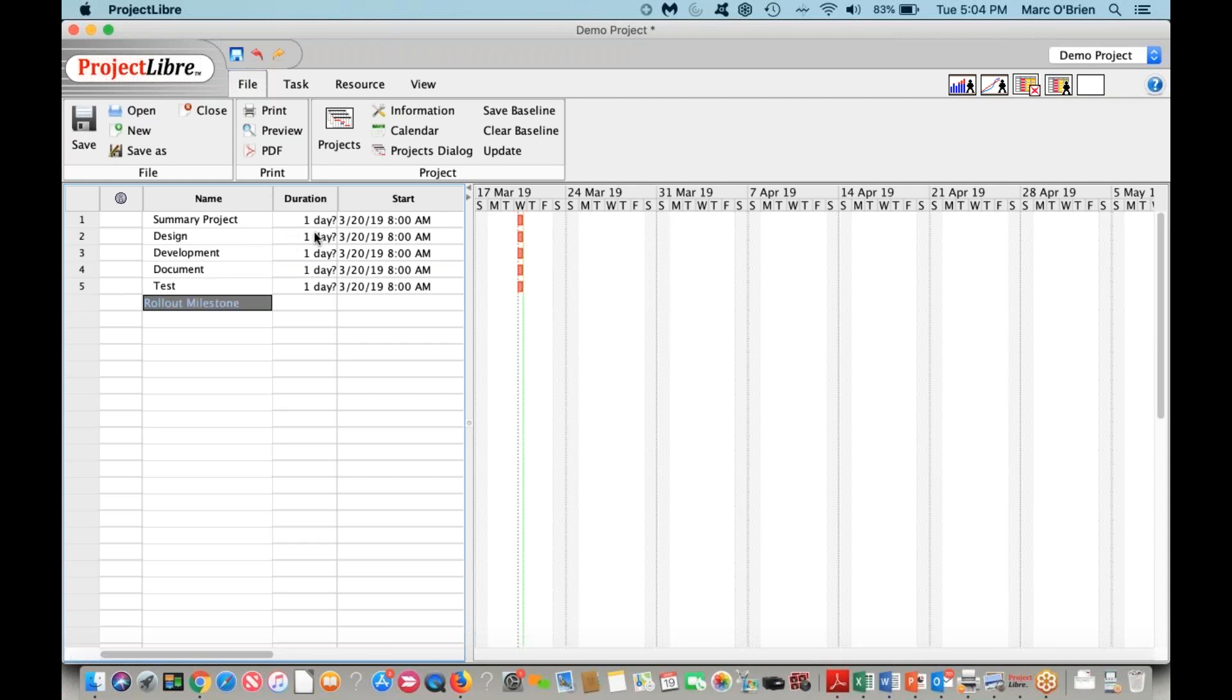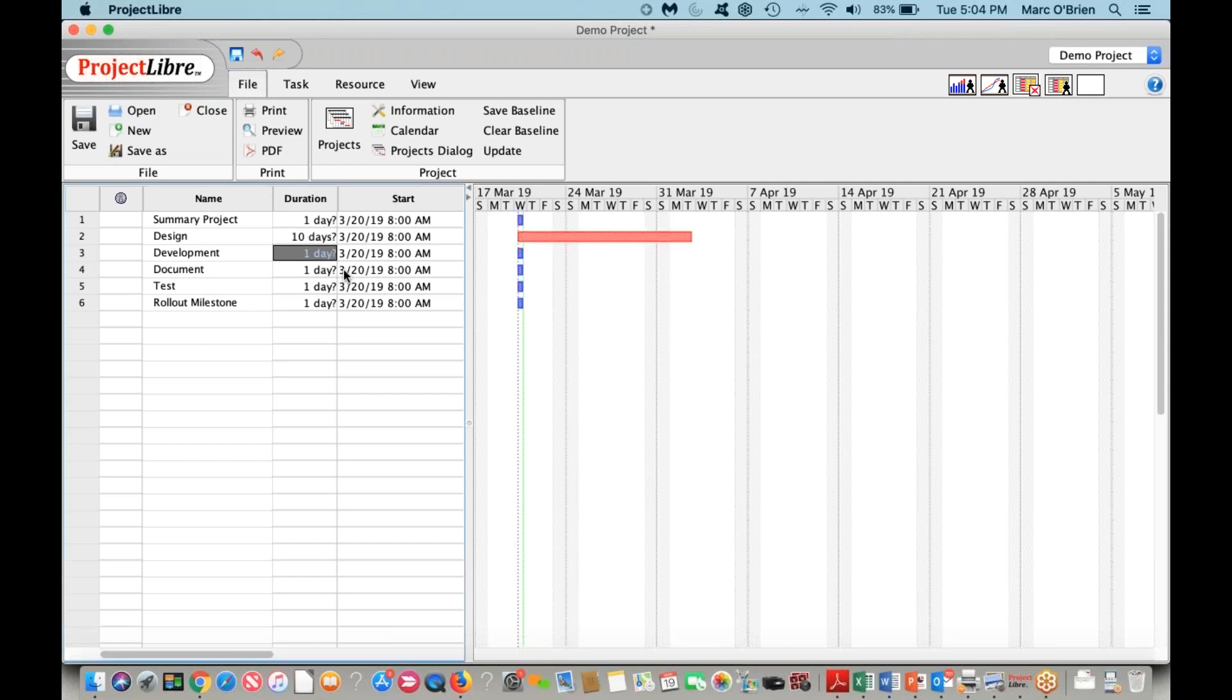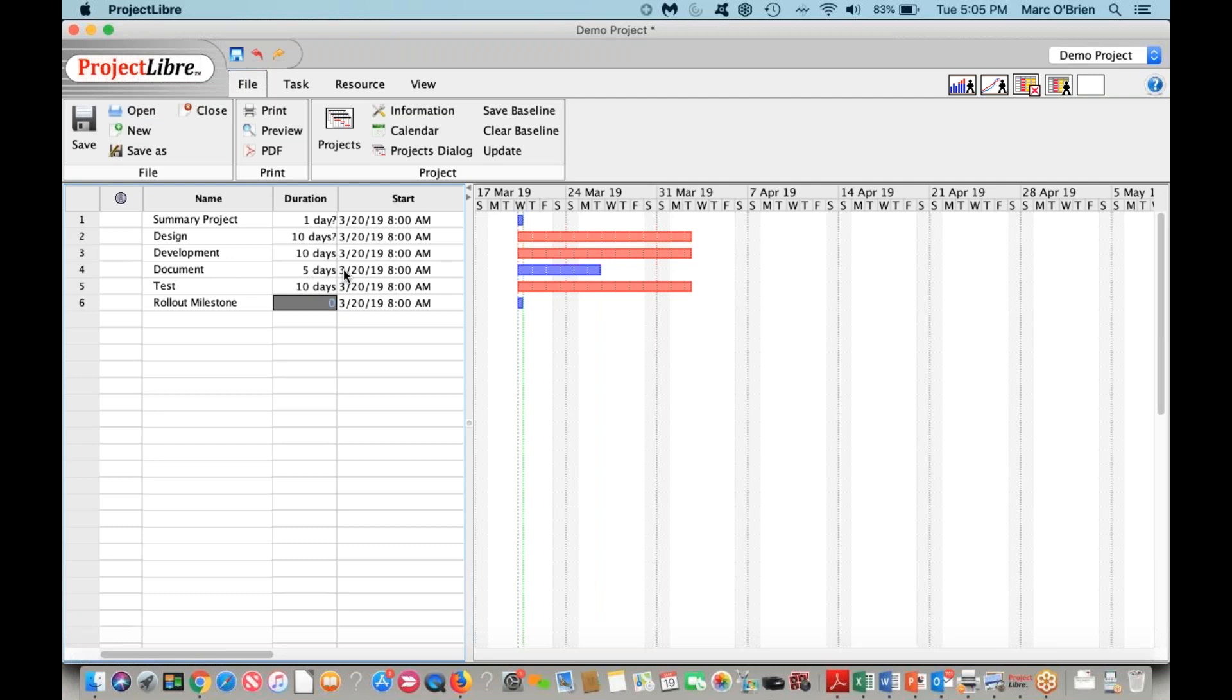We can give it different durations. I can say this is a 10-day duration. I can say development is 10 days. This is just for illustrative purposes. I can say document is a 5-day duration, test is also a 10-day duration, and milestones are zero duration. You can see that the question mark next to it is an estimated duration. I'll show you later in a further video how you can make that an actual duration.